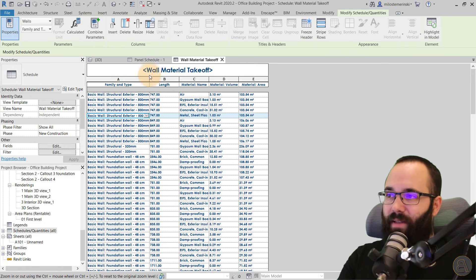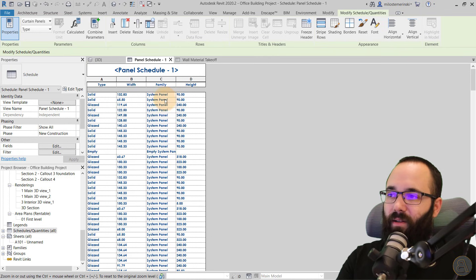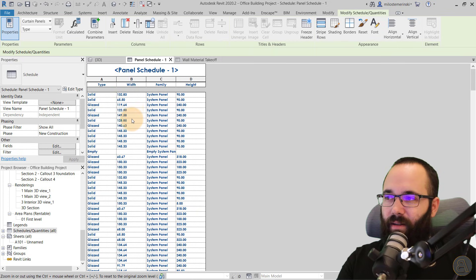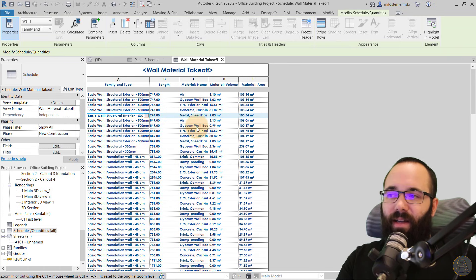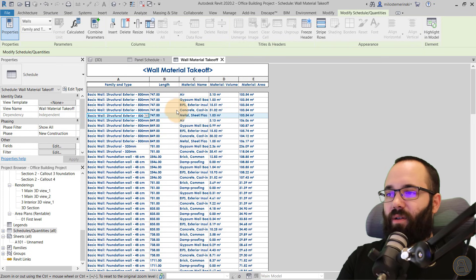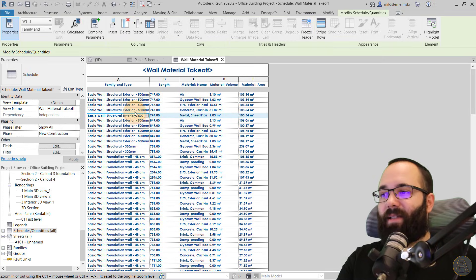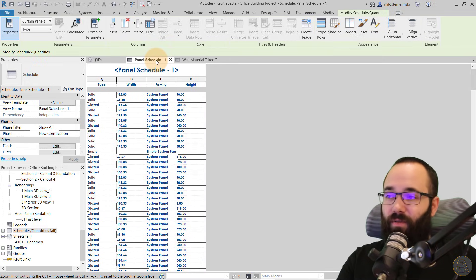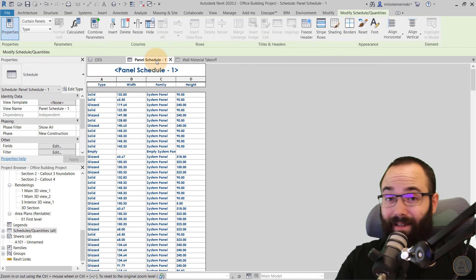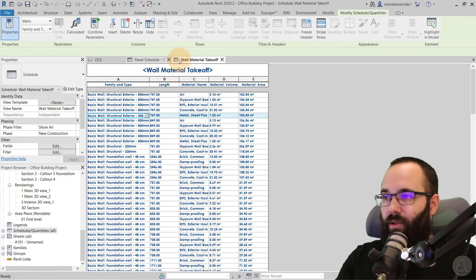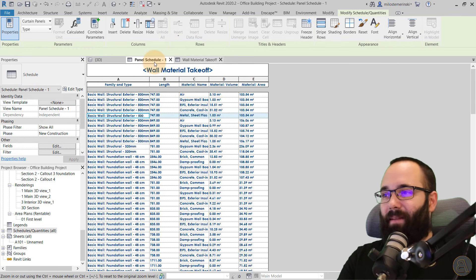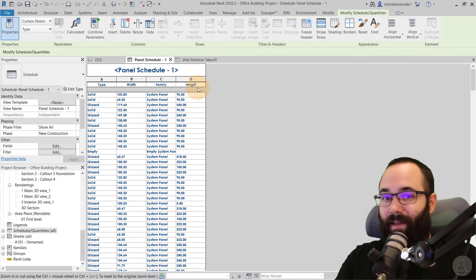This is really useful because it lets you calculate the quantities of each individual material — how much concrete you need, how much exterior insulation, how much gypsum wallboard. The regular Schedule Quantities is not going to give you information on the materials. So depending on what information you need, you pick one or the other. Material Takeoff allows you to calculate quantities of each individual material. I would call these the two main schedules you're going to be using inside of Revit.